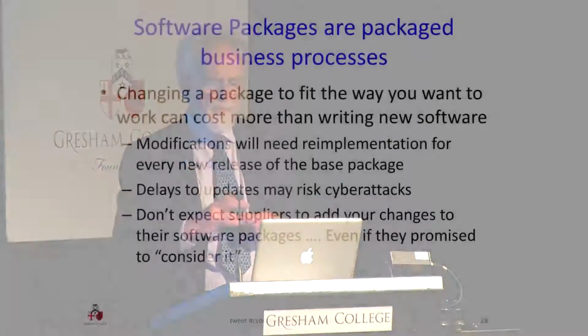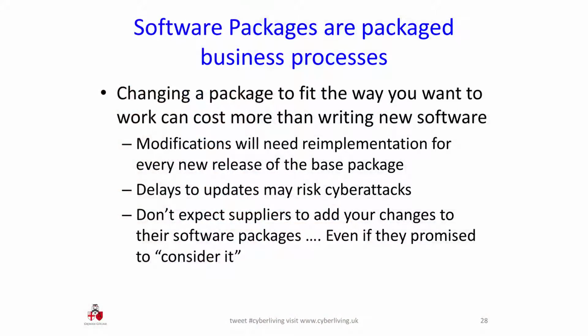That will be fine. It's worked very well in this organization, but there are reference customers for it. They found it very successful. It's bound to work well in ours, or we can make it work, or perhaps we can modify it. And there are two traps there. The first is the modification trap, because modifying somebody else's software, even if you're able to do it, is a very expensive, difficult, and error-prone thing to do. And you're going to need to do it every time the package is re-released.